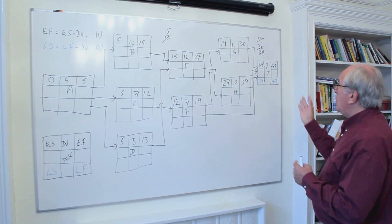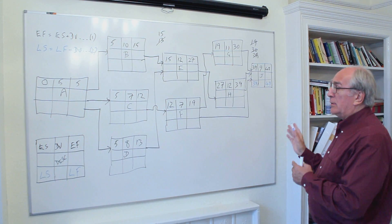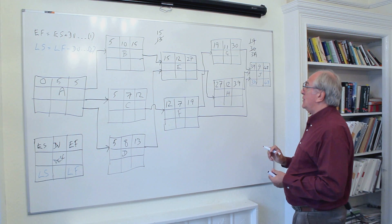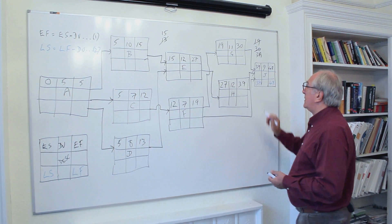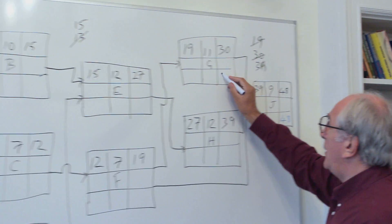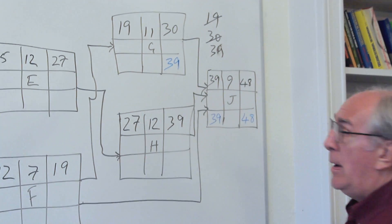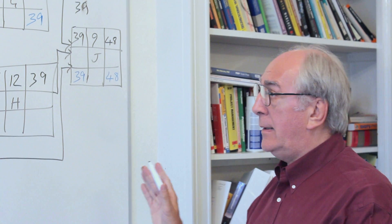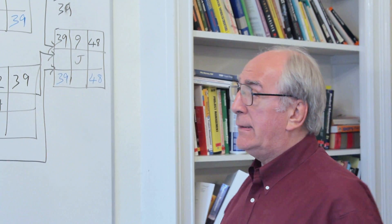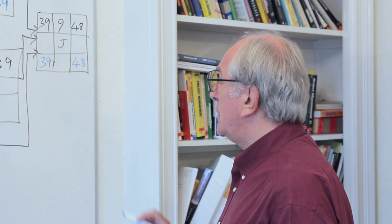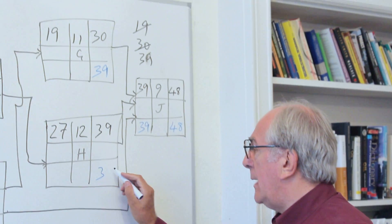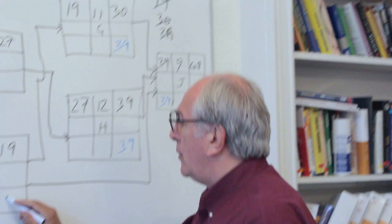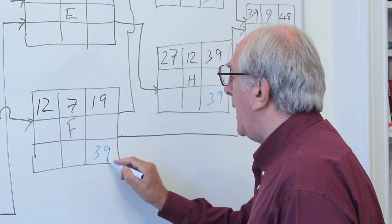We can move that backwards through the network, because what we're doing now is a backward pass. And we can say that the latest finish time for activity G is the same as that late start time for activity J. That would be 39. Remember, we're talking time units, not days, not weeks. This is an abstract here for you to understand the logic and the timing and the equation. So that 39 operates in activity H, and it also operates in activity F.